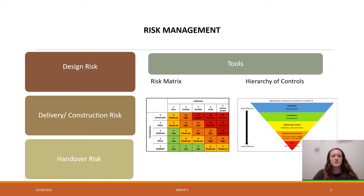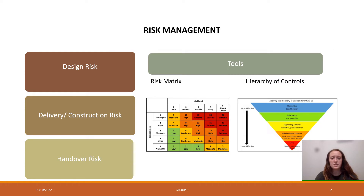Utilising a risk matrix and hierarchy of controls, our team was able to deduce multiple risks associated with the design phase, the delivery and construction phase, and the handover phase of our project. During the design phase, peer evaluations will occur to reduce the risk of errors occurring during construction. Peer evaluations normally occur on larger finance or long-term risks in a project. The project delivery and construction phase is easily the riskiest phase of any project, with the largest cost for changes and the smallest timeframe of completion.